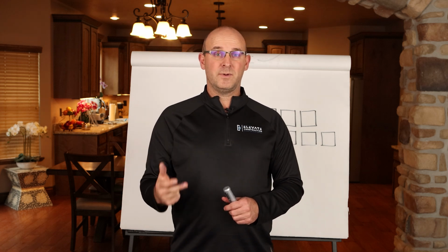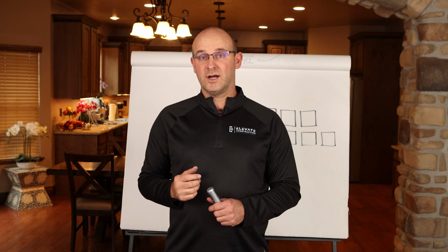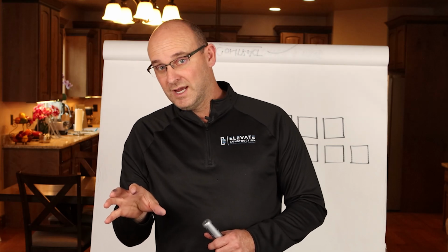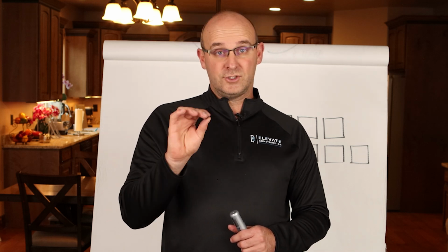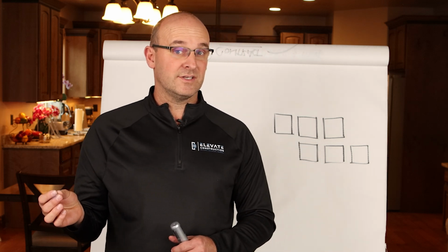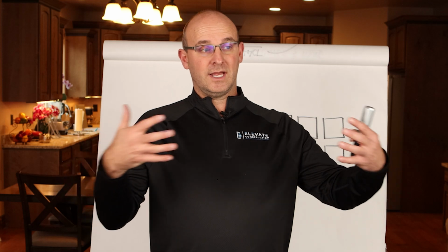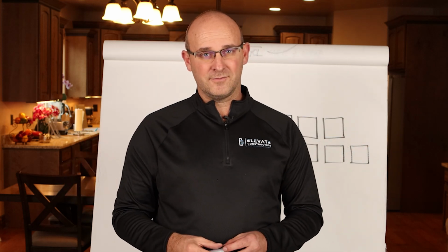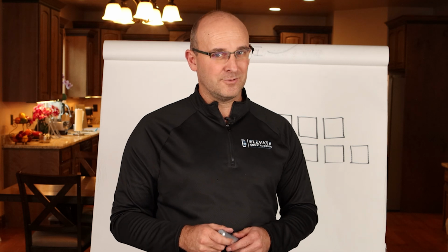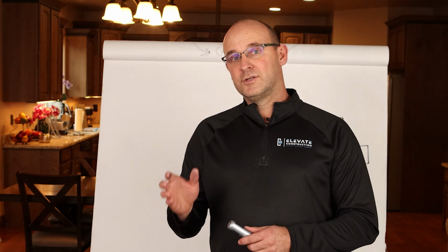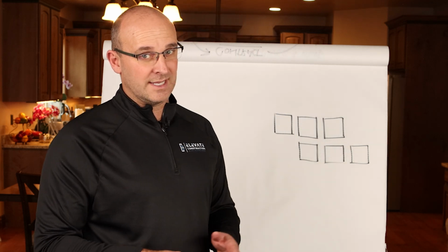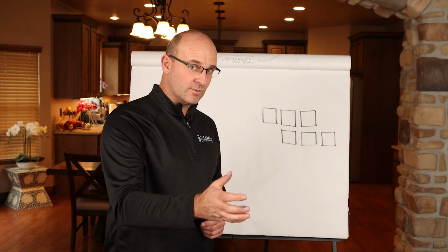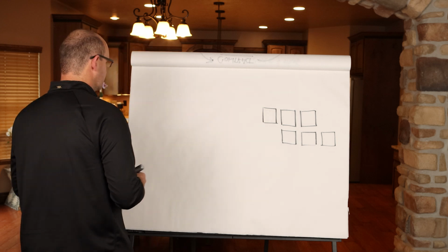We know we're going to have impacts, and we know we're going to have to update throughout. So if you update the work breakdown structure, the logic, and you have new activity IDs, or activity IDs change, and maybe even some of the old activities are dissolved, now you don't have a comparison back to the baseline. And so baselines aren't that effective. You can very easily, without a baseline, see where you're trending and really adhere to construction practices. So I just want to make that clear. Sticking with a plan, shoving that plan down people's throats, and being rigid is not how construction works.